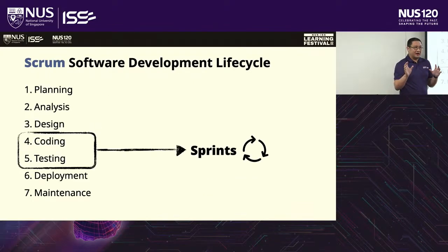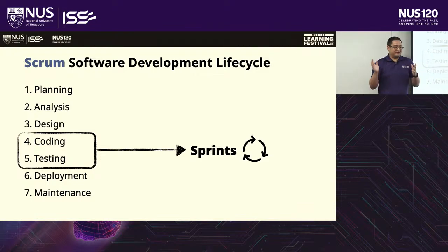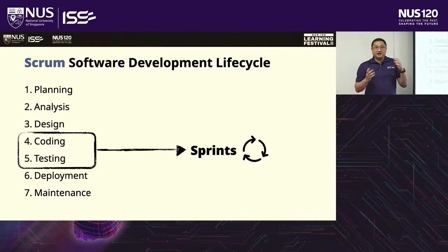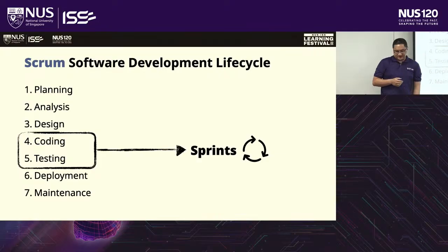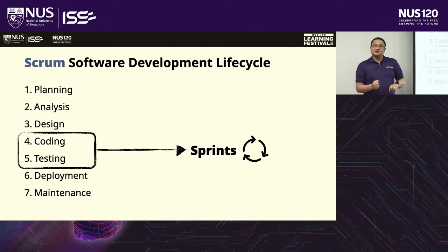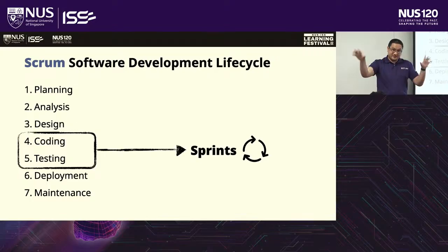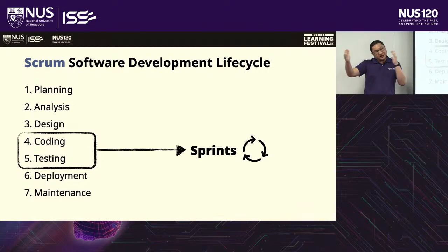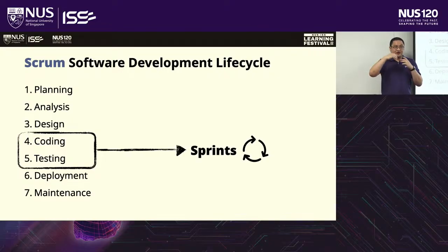In reality, I think it's been probably 15 years now of Agile, so we're doing more of an Agile software development lifecycle. This is the part where we split it out into multiple, we call them sprints. Sprints in a software company are usually 2 weeks, right? So at the start of every sprint cycle, the lead will plan out with the team, with the engineers and the implementers, to say these are the scope for all of us to achieve within 2 weeks' time. And then you do it, and at the end of it, we'll go through the testing. Either we approve, or if it's not approved, then you're going to have to fix it.